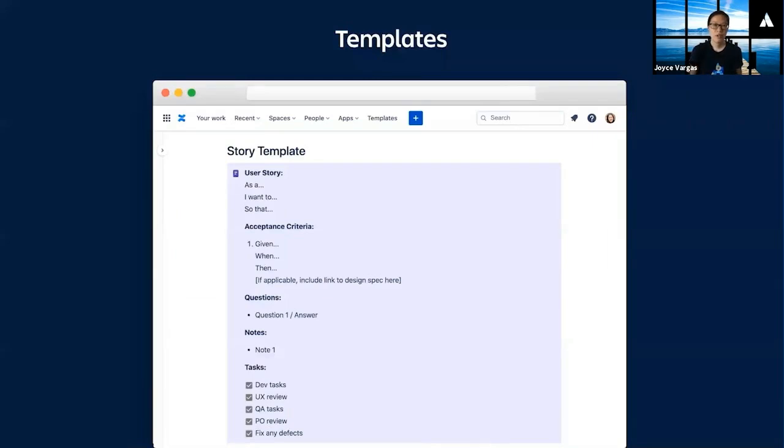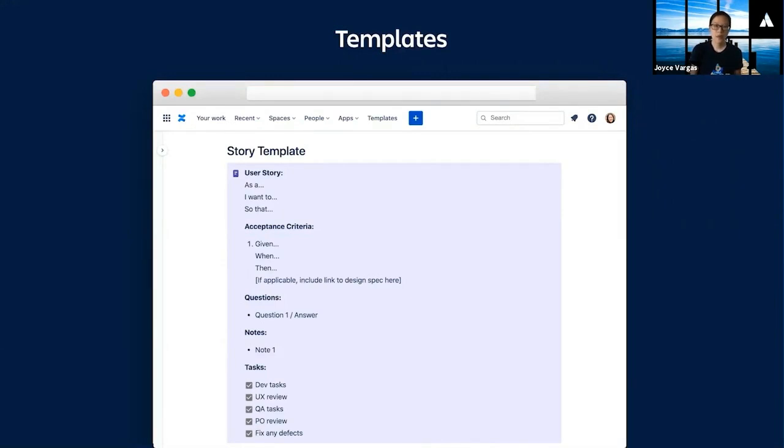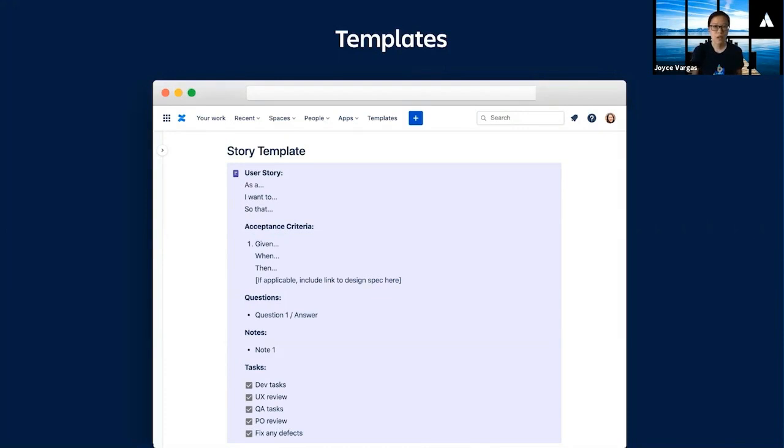To keep our stories lightweight and consistent, we use a simple template. The template starts with a user story. This is why we call our product backlog items stories. The user story follows an 'as a, I want, so that' format. This is meant to be a quick summary snapshot, so anyone that opens your issue can understand at a glance what the work is about.